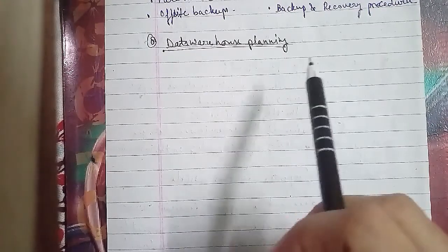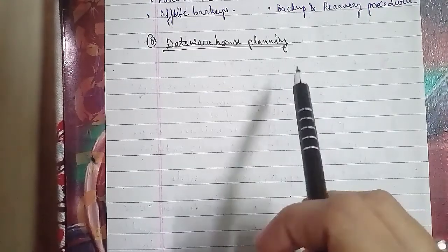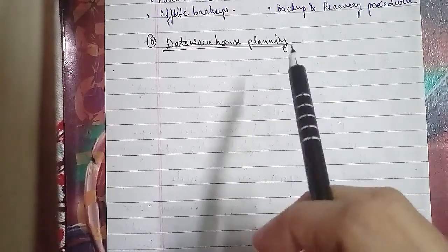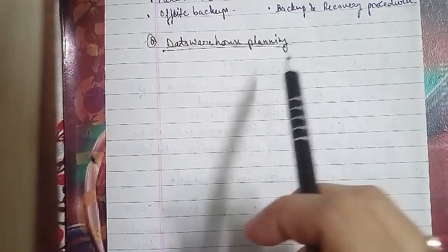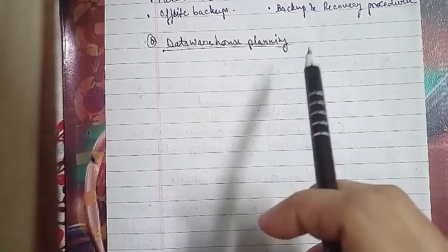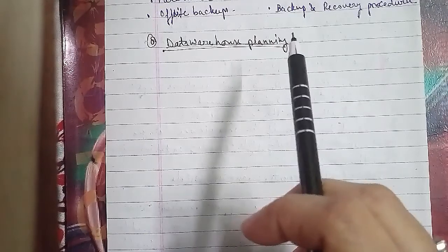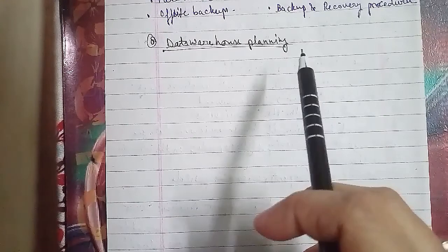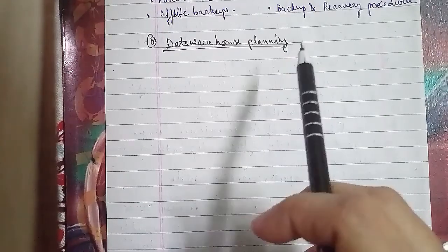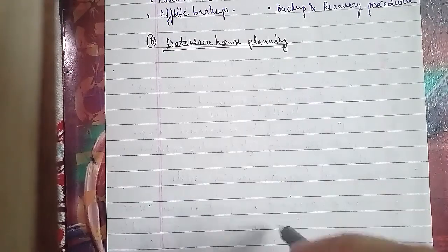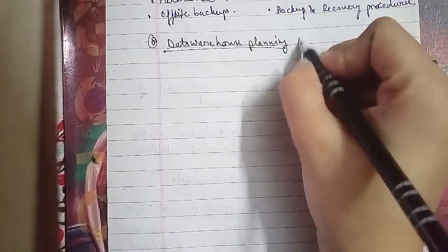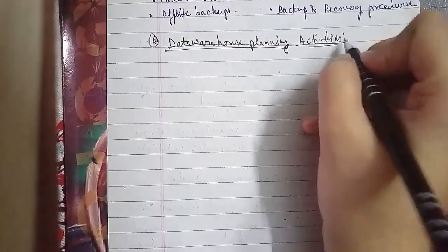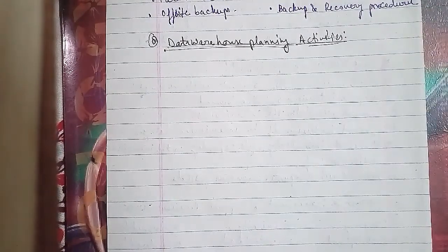Depending on the scope of the rollout, the progress of the team varies depending, among other things, on the participation of enterprise resource persons, the availability and quality of source system documentation, and the rate at which issues are resolved. In parallel, during data warehouse planning, there are two activities. The first activity is to conduct decisional requirement analysis.